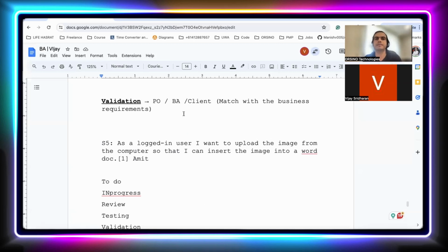So for example, let's say you are doing the release. You develop those things, and in the next month you are doing a release, so the June release. For that release, you need to create a particular ticket in the incident management system or the release planning system. If 1000 customers are already using your application, you need to inform them in advance: after 4 days we will be doing maintenance, and from 4 o'clock to 6 o'clock the application will be down, and you might not be able to access it.